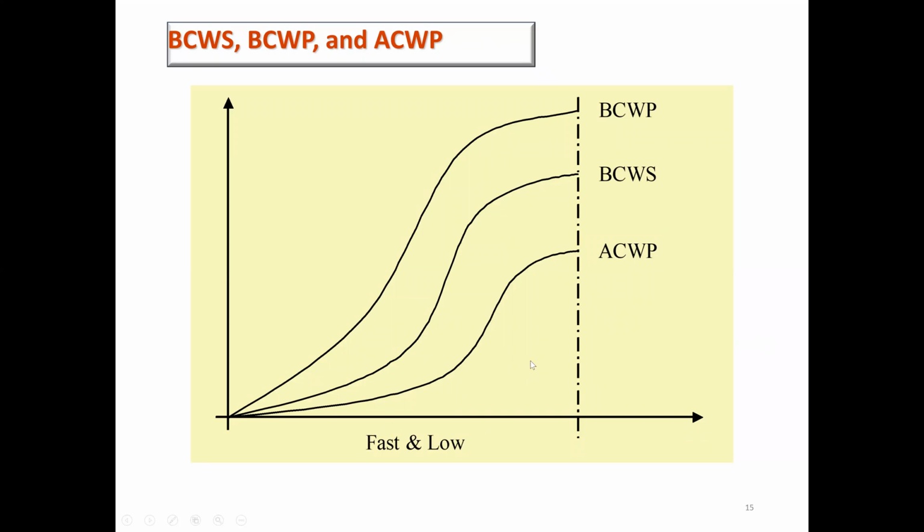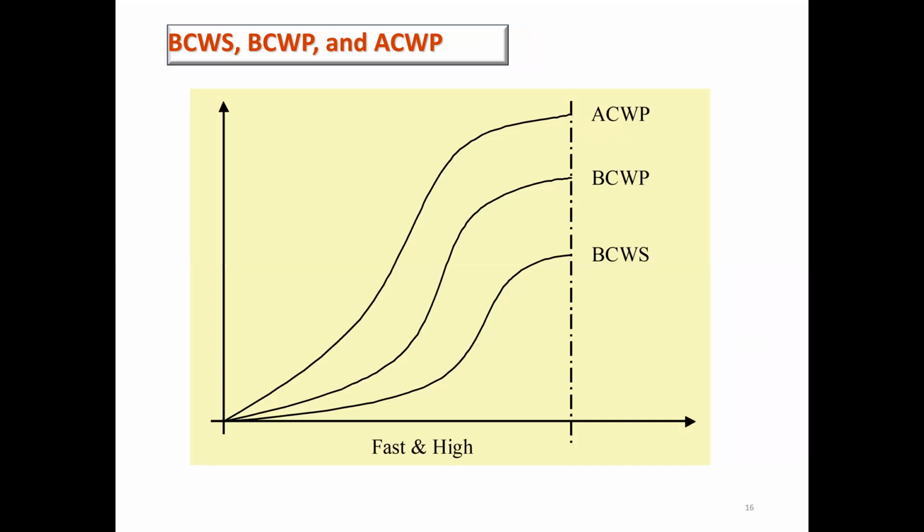Then in terms of cost, EV minus AC: EV value is more and AC is less, so this value is also positive. It means we are under budget. So project cost is low and we are making profit. This figure shows this one. So let's see what the next figure shows.